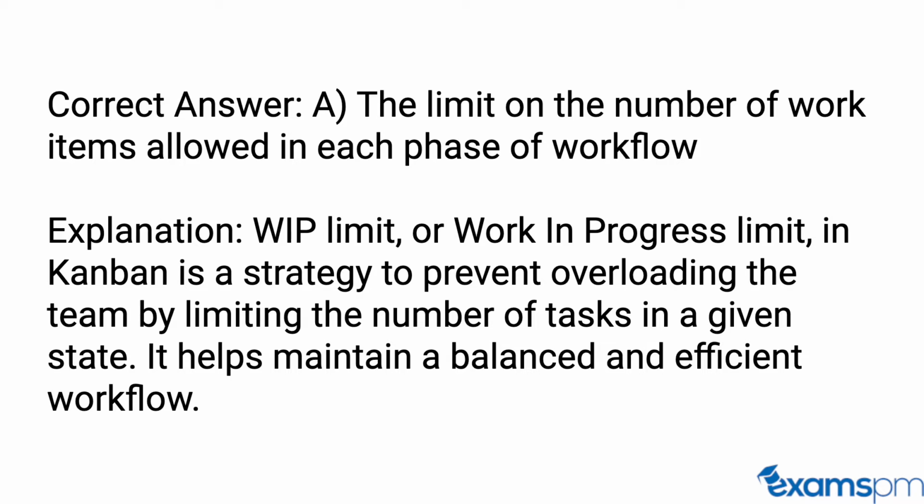Correct answer, the limit on the number of work items allowed in each phase of workflow. Explanation: WIP limit, or work in progress limit, in Kanban is a strategy to prevent overloading the team by limiting the number of tasks in a given state. It helps maintain a balanced and efficient workflow.